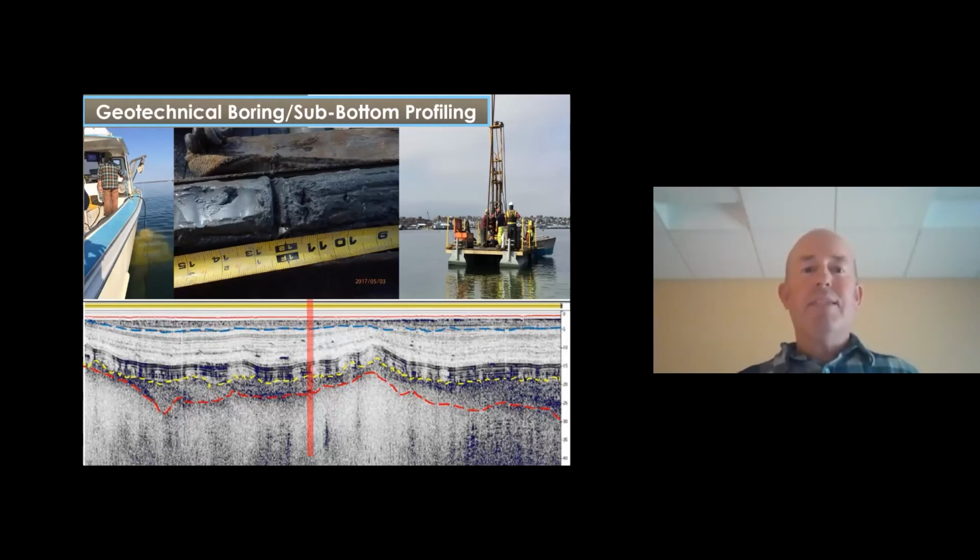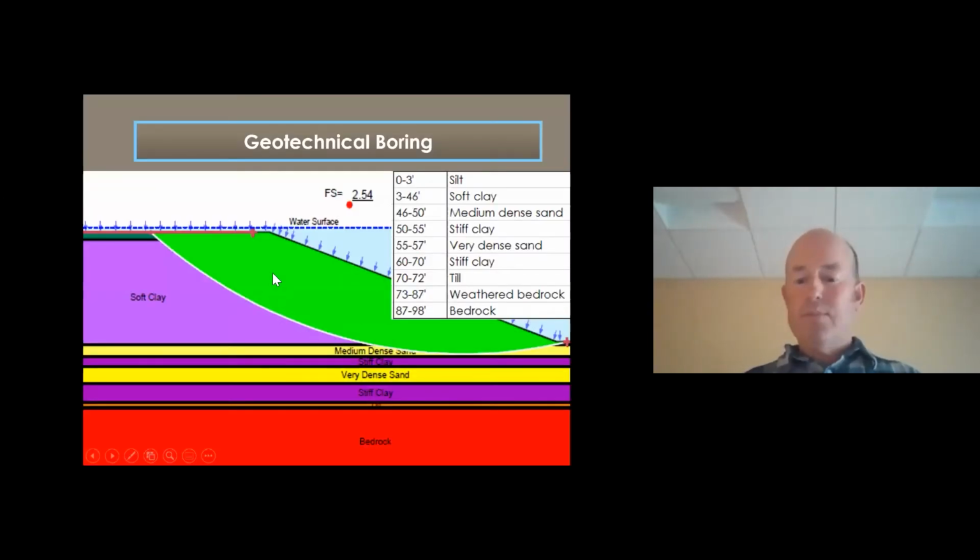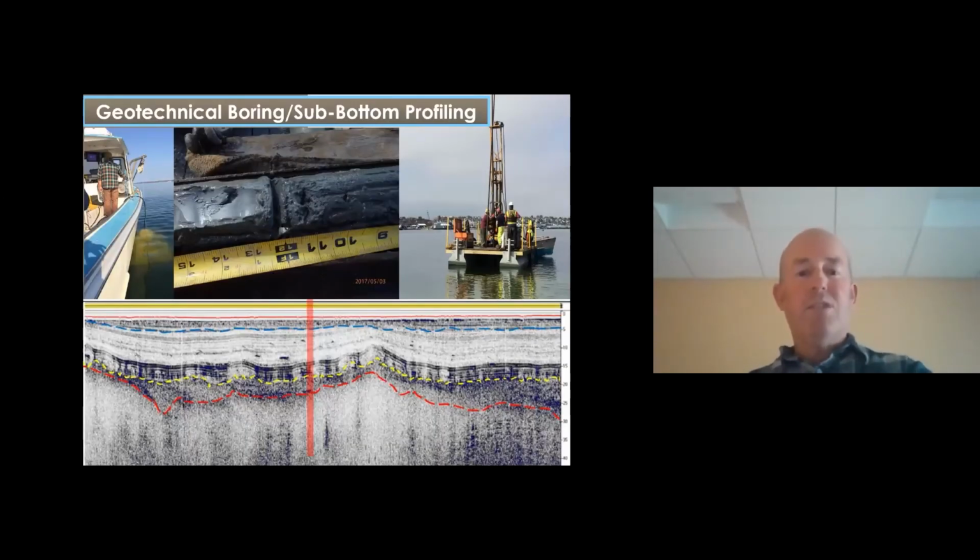A little bit on the site investigations. We did sub-bottom profiling over the CAD cell location, as well as that one geotechnical boring. Very clear surface. It's a sandy silt going down to about 3 feet. This photo here shows that break, and then we get into Sunscott Formation marine clay, which extends about 50 feet down. So it shows up very clearly on the sub-bottom profile here, and this red is our boring location. This was all used for permitting design.